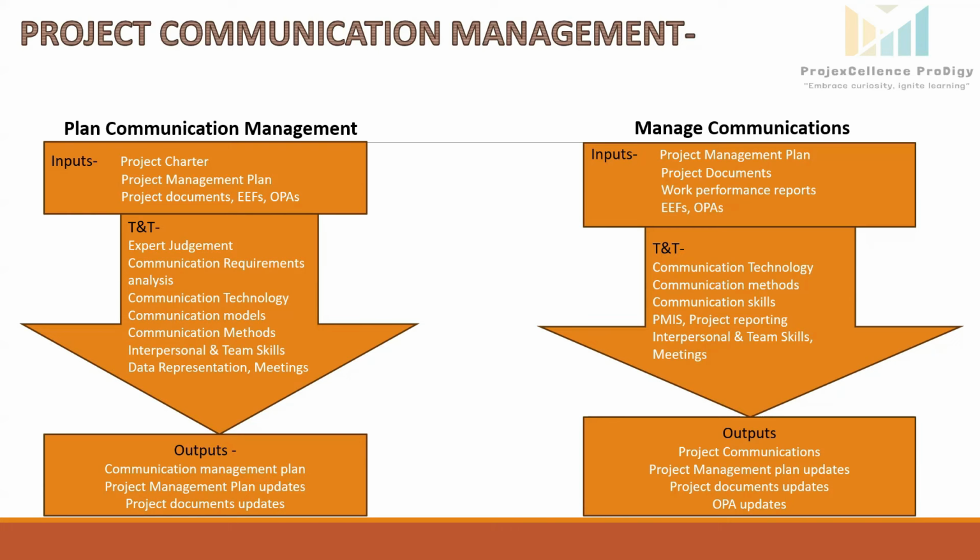to include monthly reports. Project documents updates. So various project documents will be updated. For example, issue log will record the communication challenges and resolutions faced during this process. Lessons learned register will capture what worked and what didn't in communication process. Project schedule will update the meeting dates and reporting timelines. Risk register will add the risk related to miscommunication or delays in information sharing.